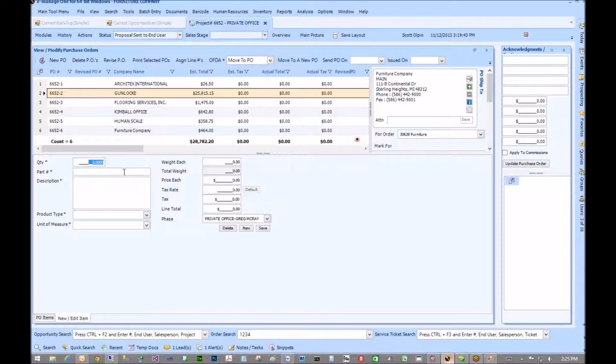But still that cost will show within the order, correct? Yes, because see how these purchase orders are assigned to orders here. So if you add a line item onto a purchase order, it's going to be costed against that. Really, the purchase order is the estimated cost. It's your second level of estimate. Your real actual cost is the cost that you get from the bills coming from your vendor. So that cost is tied to the purchase order, which is tied to the order, because that's how we created them. Does that make sense?